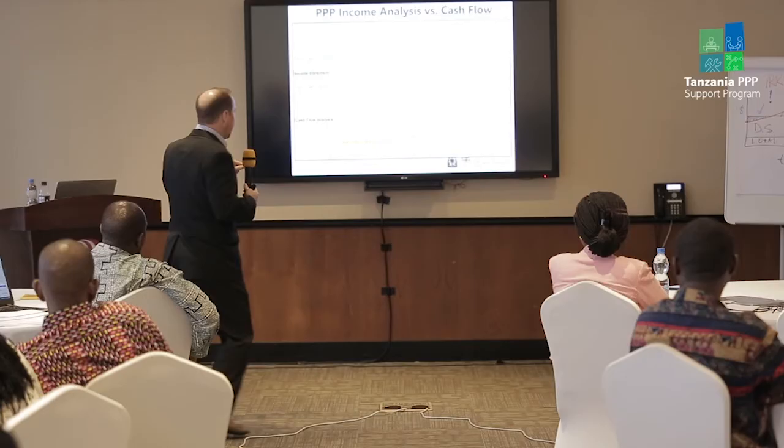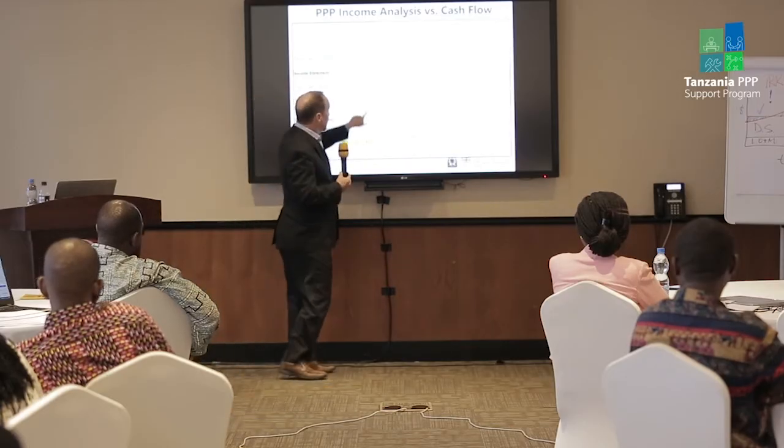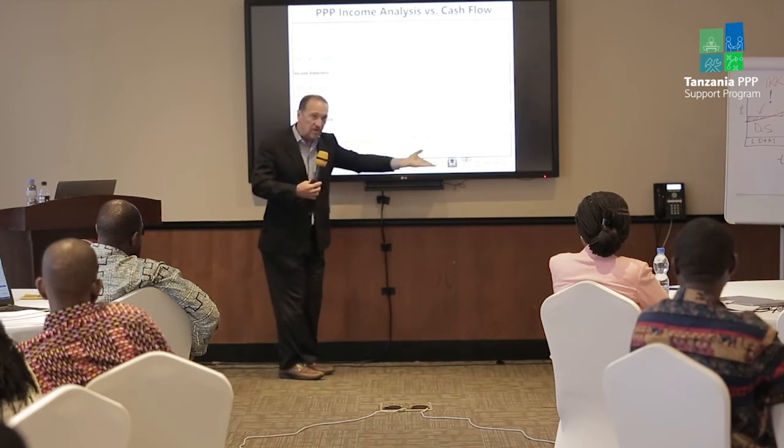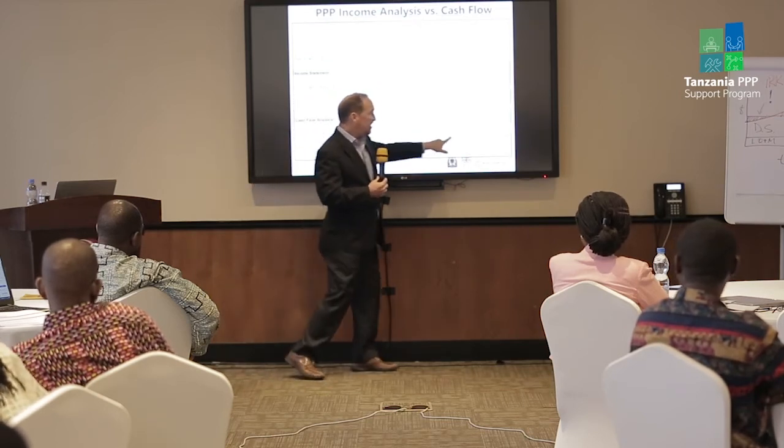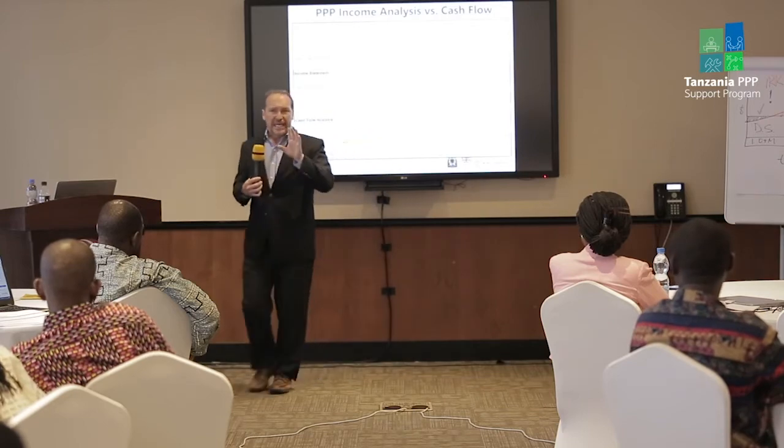That's a shortcut. Now here, this is sort of strange. Down here in bold I have the net cash flow. How much is the initial equity investment in this project? 25, yep. We show that here. That's what they put in year 0. That's money going away from us, right? Here are the net cash flows. Keep in mind, is the IRR on equity computed based on net income from the profit and loss statement or net cash flow? Which is it? Net cash flow, you're right.